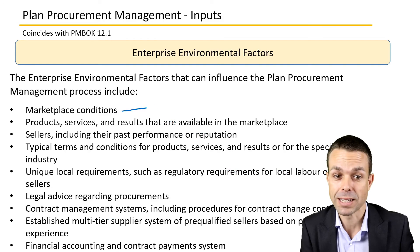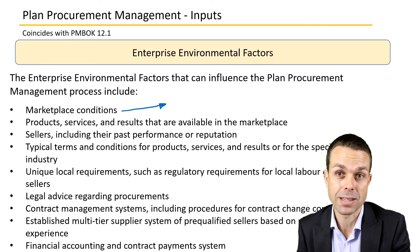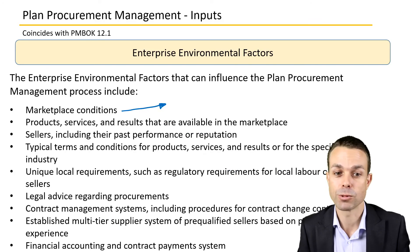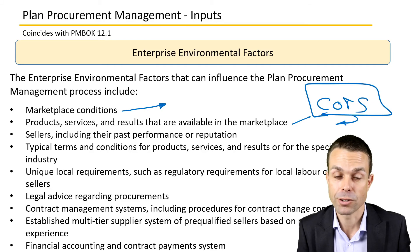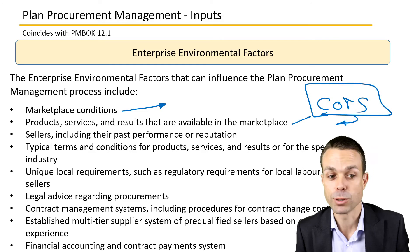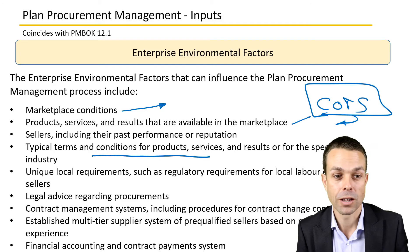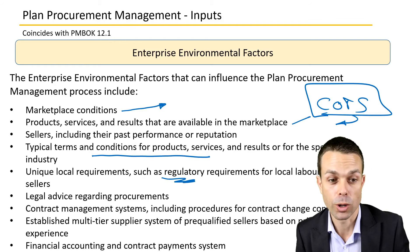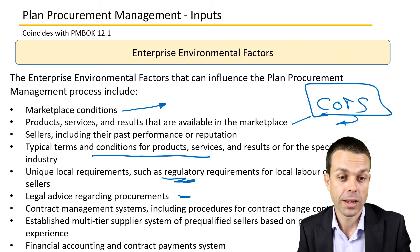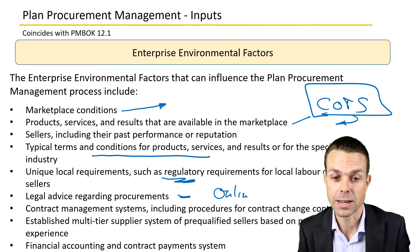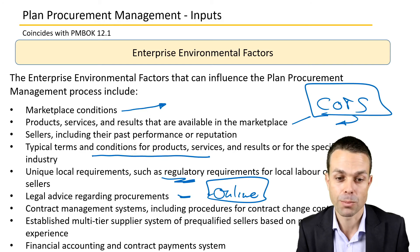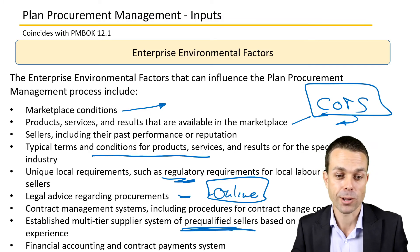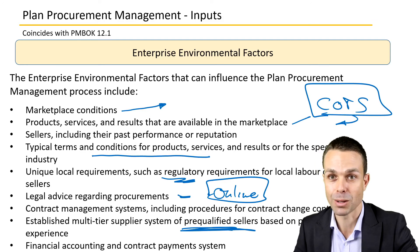Enterprise environmental factors as an input could include marketplace conditions — the current marketplace might make it better to buy something than to make it. Products, services, and results available in the marketplace, such as commercial off-the-shelf items, may fit neatly into our project. Seller information including past performance and reputation, typical terms and conditions for that industry, unique local requirements such as regulatory requirements, legal advice regarding procurements, contract management systems for managing and signing contracts online, established multi-tier supplier systems of pre-qualified sellers, and financial accounting and contract payment systems are also relevant.